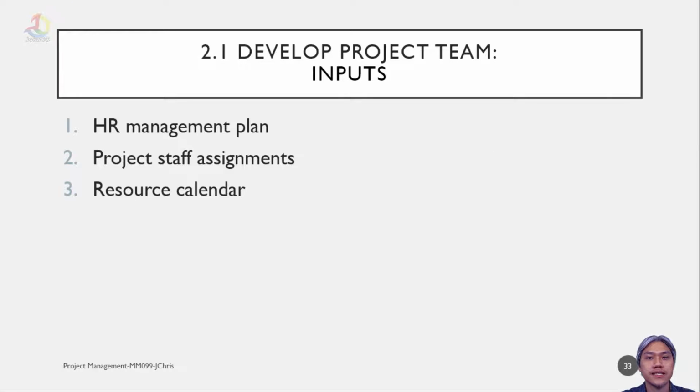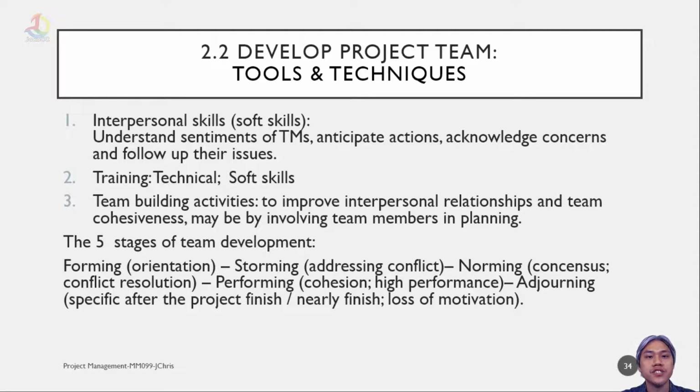The inputs for develop project team are the HR management plan, project staff assignments, and the resource calendar. The tools and techniques used are interpersonal skills or soft skills, to understand the sentiments, to anticipate action, to acknowledge concerns and follow up on their issues. There's also technical training, and team building activities to improve interpersonal relationships and team cohesiveness, which may involve team members in planning.